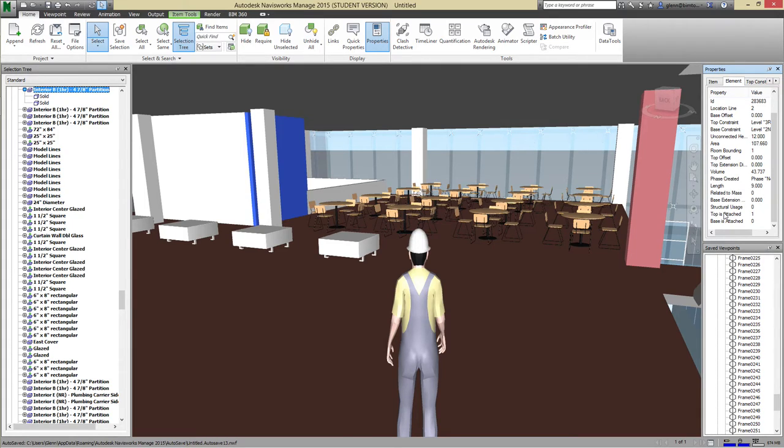So this is a really good way of interrogating to find out what you have to hang on to. Because one of the biggest challenges for people in Navisworks is, great, this has an area, this has a length, especially if you're going to do model-based estimating. Not all files give you the same information. So a big part of what we do is trying to unify all this or make sense out of it. Oh, you have an area, but you called it surface area. So I need to go through. So yeah, you're right on target.